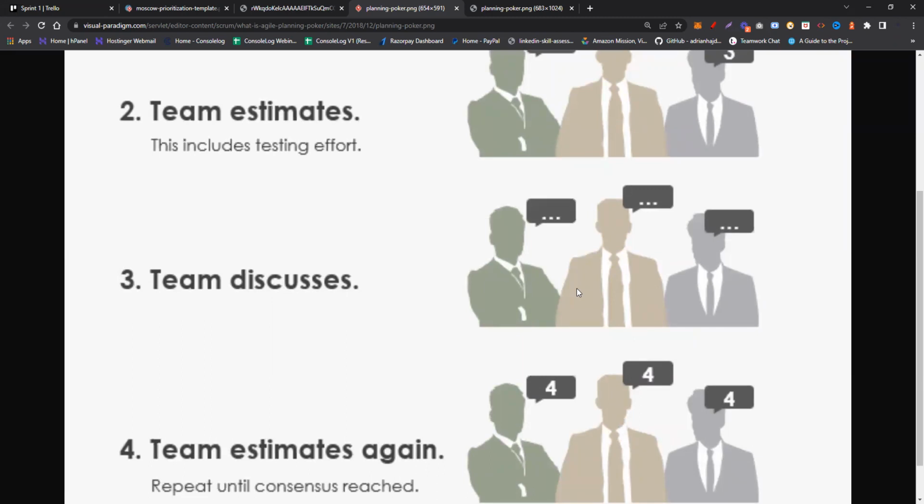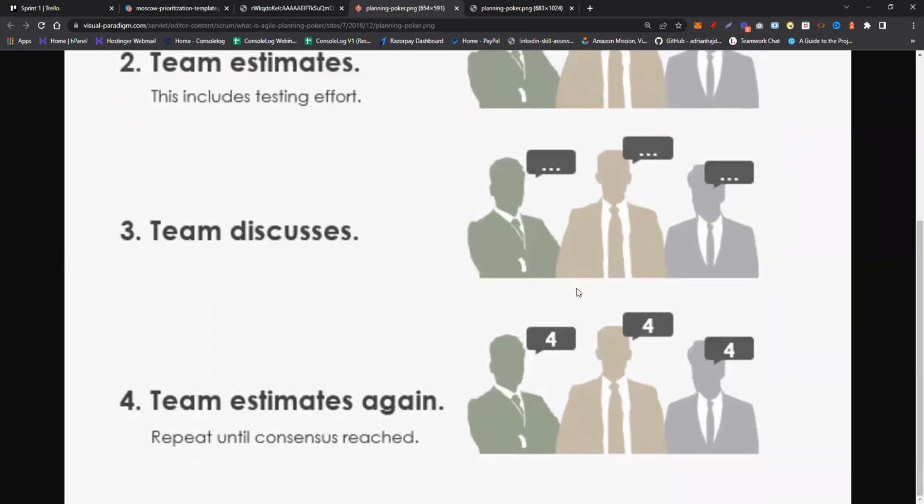Okay. So whoever thought 2 will explain why he thought 2, and the other person who thought 8 will share his idea why he thought 8. Then you can see, in that meeting itself, there is a hell of a lot of idea gap. How the first person is thinking, how the next person is thinking. Once they discuss, that gap is going to be mitigated. Then every team member will be on the same page. Once the discussion is done, ask everyone on your team again, because others are also listening to their ideas. So if they want to change, they can also change.